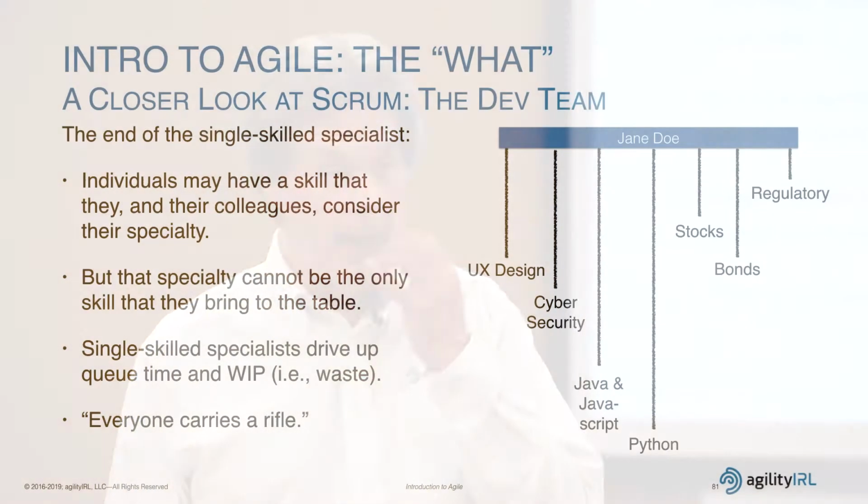And we've had this. We've had a daily scrum where one person looks at the board of things to do and says, well, I don't know how to do any of those things. Super. Which one do you want to learn? You don't get to do nothing. We have a lot of work to get done. So pick one, and then we'll figure out how to teach that to you. A typical way of doing that is pairing. Pair them with somebody else who knows how to do that.